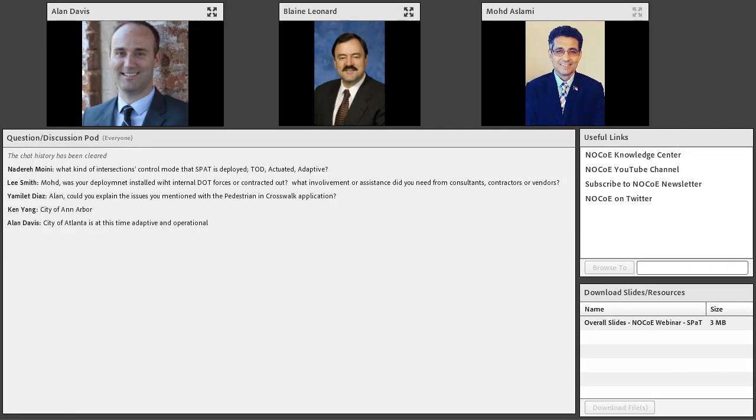It comes from Lee Smith, and it was a question directed to Maud. Was your deployment installed with internal DOT forces or contracted out? And what involvement or assistance did you need from consultants and contractors or vendors? Like I mentioned in my presentation, our project was a turnkey project. So basically, we required our contractor to do all the work, the design, the procurement of equipment, the installation.